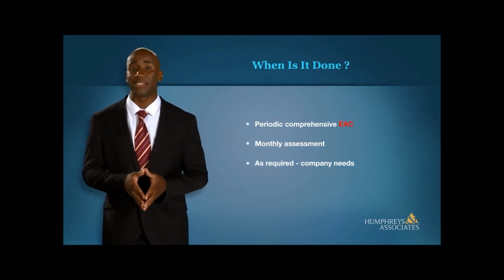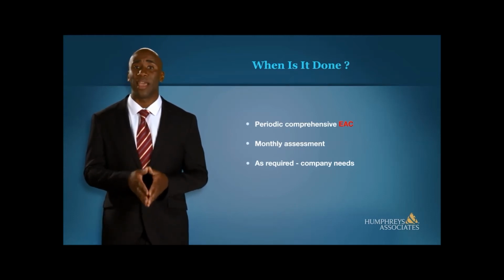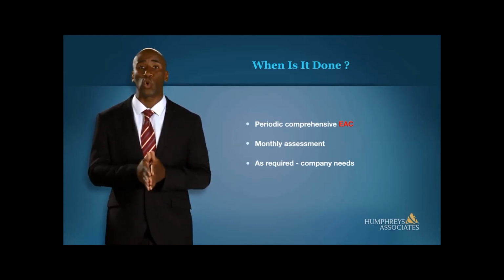The monthly EAC assessment is not as stringent as a comprehensive EAC. How is this monthly assessment accomplished? In an earlier part about variance analysis, situations where the control account manager might revise the EAC were discussed. These revisions are usually based on the variance cause, impacts on the project, and the corrective actions taken or proposed. The revisions may be for labor, material, subcontracts, and other elements where the CAM does not believe that the variance is recoverable.